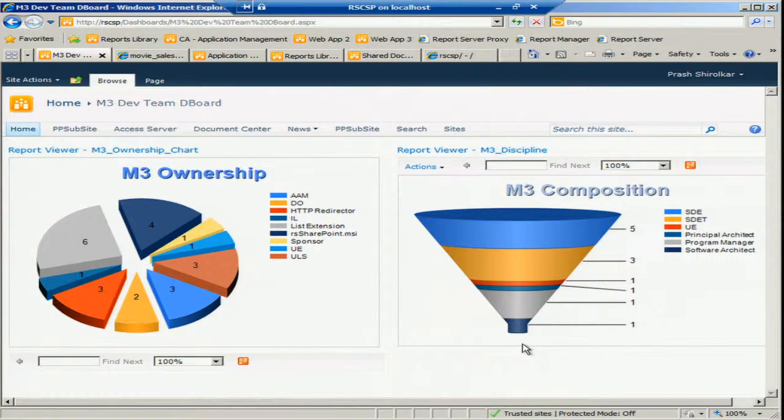So obviously, the largest slice of the pie is what, as a project manager, or if you're a program manager, you want to keep in mind, close monitoring. Because at a certain point, if it slips, then you either add more resources, and you may not get those resources, and then if this is a key feature, it may have to be cut.